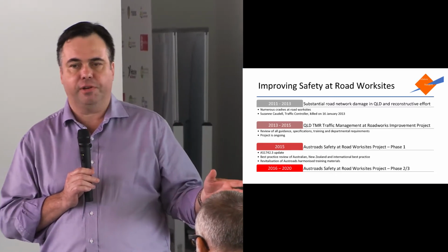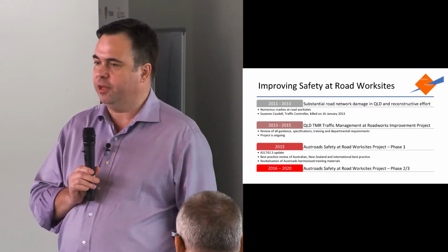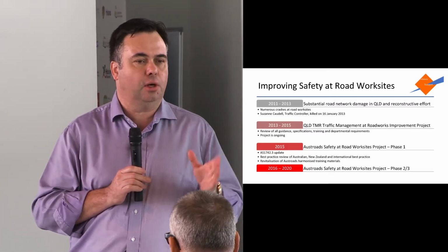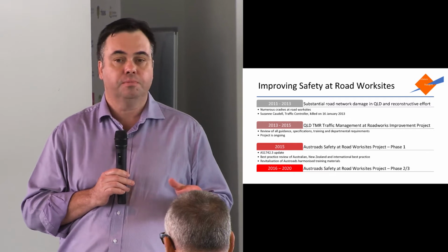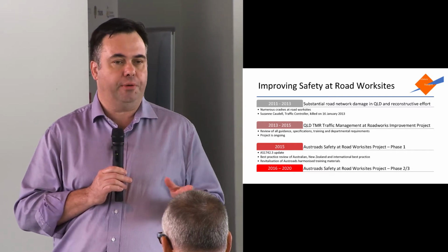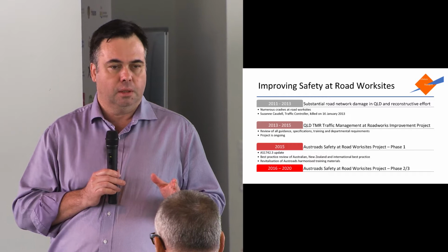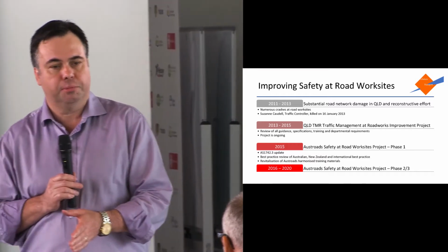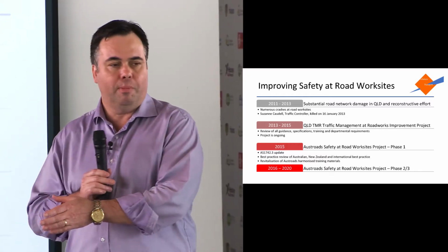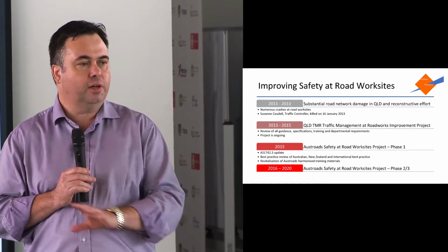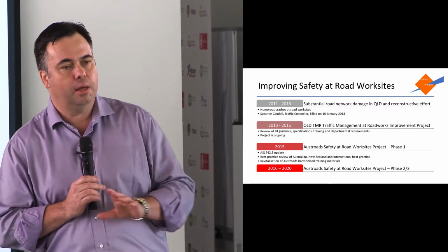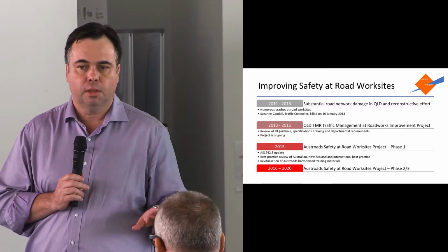That program funds 75% of the repairs, so Queensland had to fund the other 25%, so $8 billion worth of road repairs alone, which had to be done in a 2-year period to get the federal funding. On top of the normal construction program and normal maintenance activities and everything else that local governments are doing. So, a massive amount of work.